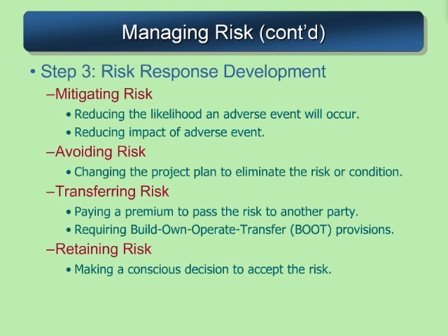We can decide to transfer that risk. Maybe we take out some insurance against weather problems and weather delays in a construction project. Or if it's something that the owner of the project really wants, we decide that it's the owner's risk to take on.